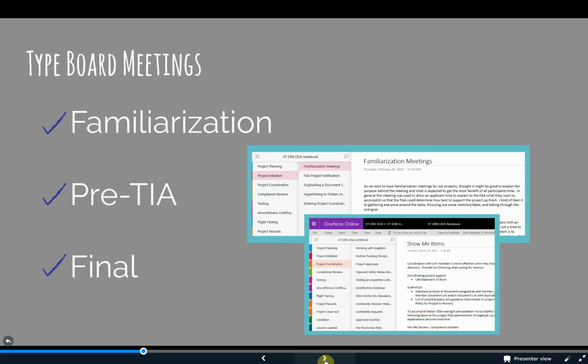A certification engineer, along with any other engineer or suppliers needed, should be able to present information regarding the design, supplier support, unusual vendor relationships, how previously approved data or equipment is being integrated, what drives a project schedule, and how compliance is expected to be shown. Again, we're back to that project scope, being very clear on what's going to happen. The expectation is to get participants engaged in a discussion early so that questions can be answered up front in a program.